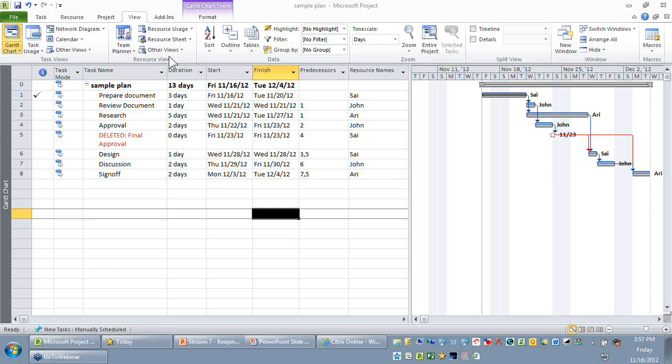So that is the reason why, before you incorporate the new activities into your project plan, you take a copy of your start and finish fields into another set of fields called Start1 and Finish1. Then add the new set of activities, and compare Start1 and Finish1 with Start and Finish using the filter we demonstrated. This way, you will know only those activities that got impacted and need approval from the customer. That is why we are baselining only impacted activities.